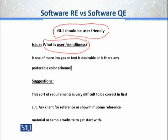Rather than blindly starting to develop the design, get approvals as a mitigation plan. Generally, the client is asked for their preferred color scheme, reference websites, or reference material. Ask them to share these, or share multiple reference websites with them to get a starting point — because turning textual descriptions into visuals is not an easy thing. Whenever you write a requirement like 'user friendliness should be there,' it is an open-ended question. Break it down step by step — in step one, go for reference websites or reference material.